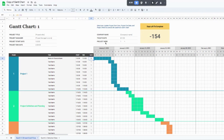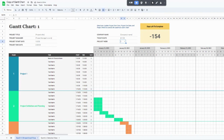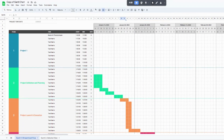Up here where it says 'Project Week' and shows week one, this means which week of the project you're on — in this case you're at the very beginning, seeing January 2nd. You can come into this dropdown menu and select, say, week three of your project, and it'll automatically focus on what tasks are happening that week as opposed to showing you what you've already completed. This is really helpful for larger projects where you just want to focus on what's to do going forward.